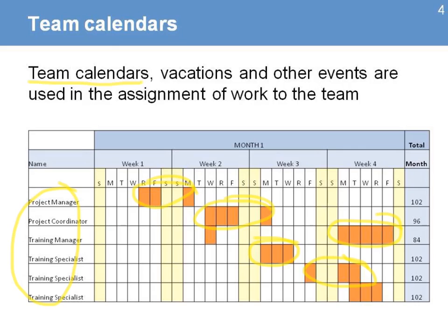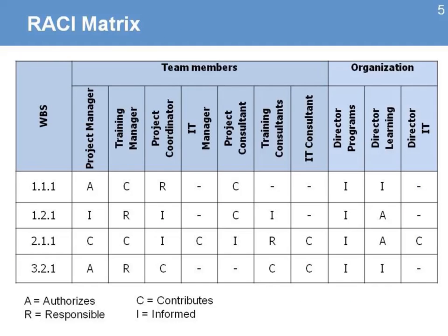And this usually is a process of negotiation at the beginning of the year and making sure that people are able to identify the time they're going to be taking vacations or trainings and making sure that you're not missing the whole team during a critical moment in the project.